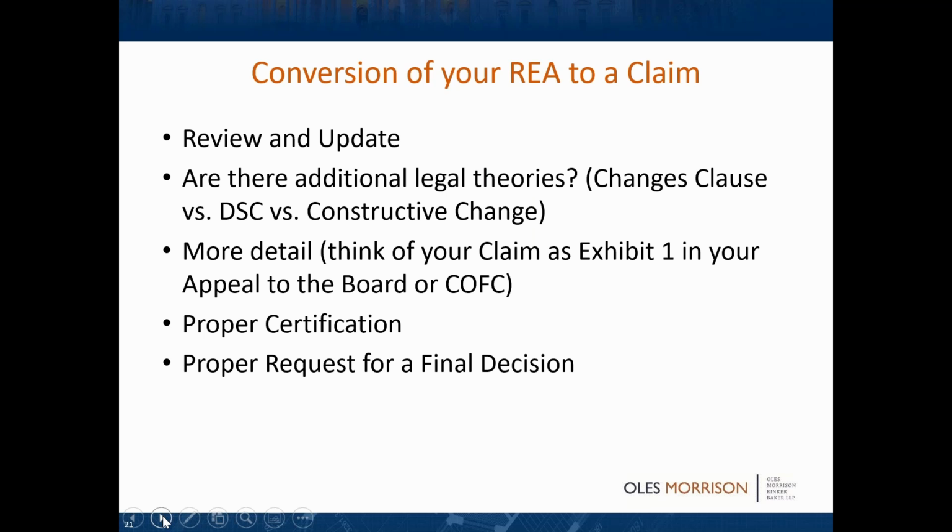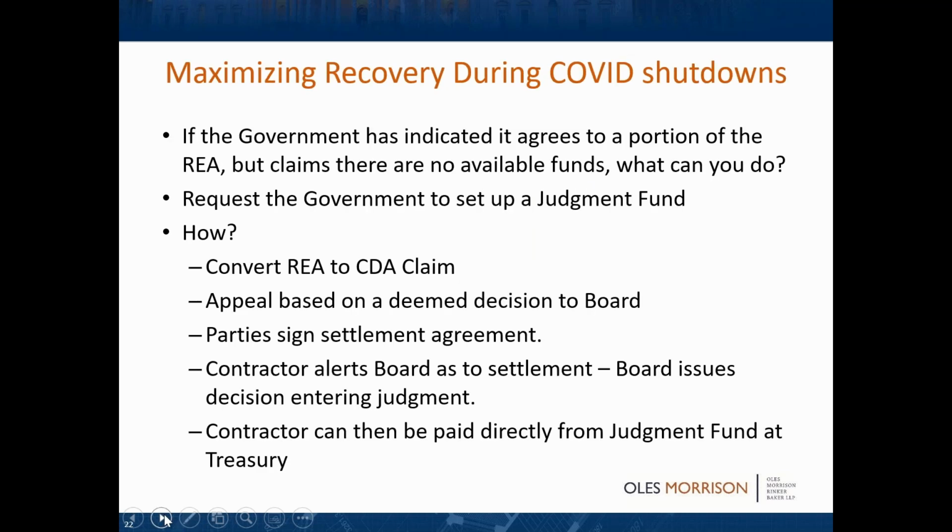Sometimes people, though, don't put as much effort into their REA, and so you want to look, are there any additional legal theories that you want to add? To include amounts that you want to ask for. This is the time to figure that out. Also, to add more details, make sure that you have a proper certification and that you request a contracting officer's decision.